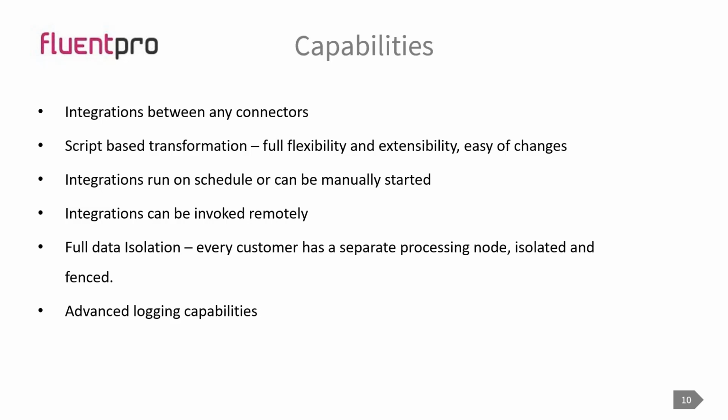Our integrations don't run all the time. It's not constant monitoring, because constant monitoring creates additional load in the system. We run on a schedule, so you simply define, okay, run this job every 5 minutes, or you can have it manual, or you can say run every hour or every day. You can define that schedule for your synchronization. The system will identify everything that changed from last time until execution time, and will do all its work and magic.